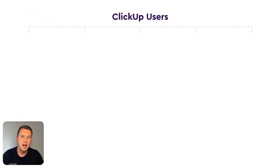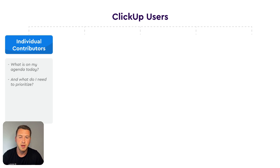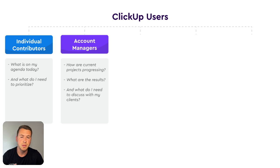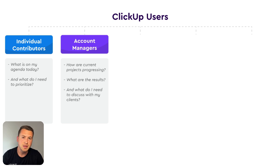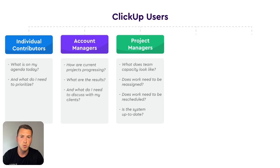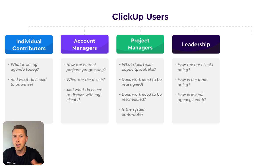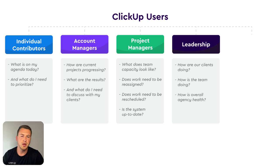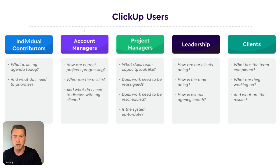As an agency, you need to think about the five different users that are going to be in your system when you start creating these views. Number one: your individual contributors — people who just need to see the work on their plate. Number two: your account management team, who need to see work across multiple clients at a higher level. Number three: project management or team leads, who need views for assigning work, checking capacity, and remapping due dates. Number four: your leadership team, who need to see overall project health across all clients. And lastly, your clients — who need a view of all the work you're doing so you don't have to send them status update after status update.